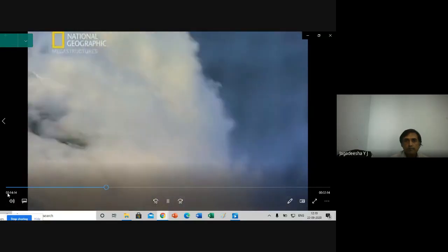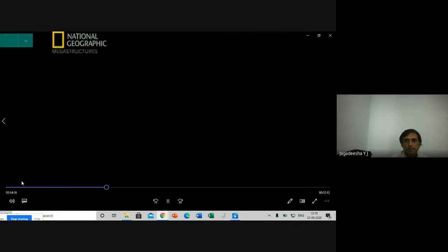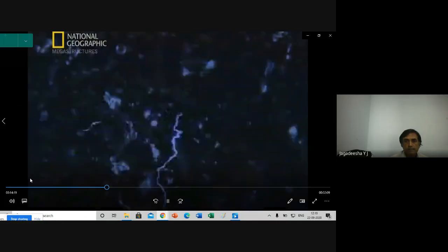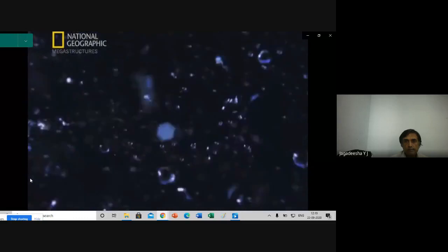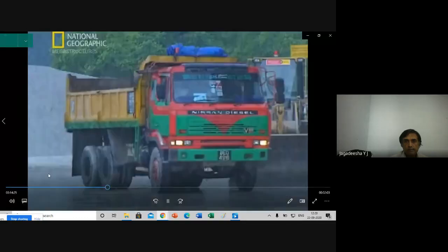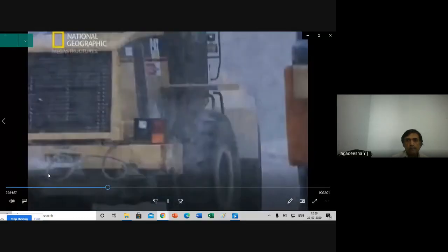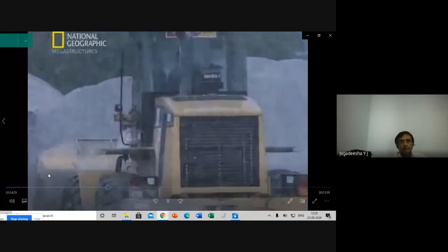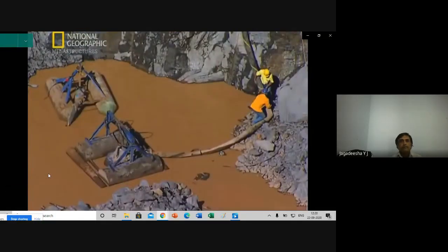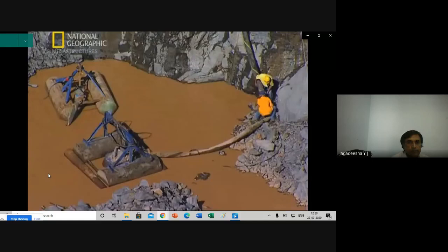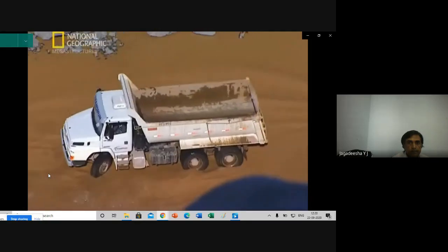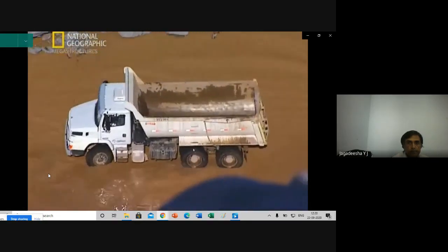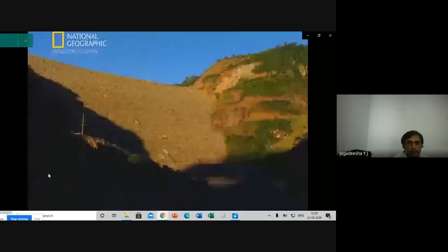Brazil has some of the most torrential rainfall in the world, and rising water could put the cofferdams under pressure or even burst the walls. That would bring a devastating wall of water down on hundreds of workers. The engineers hoped that they would have enough warning of rising river levels to safely evacuate workers. Until the main dam walls were built, all that stood between the workers and the threat of flood was a wall of rubble.